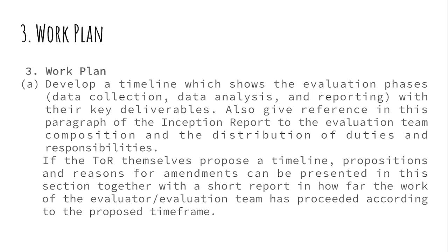So if the TORs themselves propose a timeline, you have to work within that timeline they propose. Or if you have any reasons for amendments, it's at this point you request for amendments. Maybe you say I may need more time in the field, and also maybe in developing the report for this evaluation. So this is the section where you elaborate on that. But normally they give you a timeline in the terms of reference, and it's pertinent that you follow and work within the timeline.